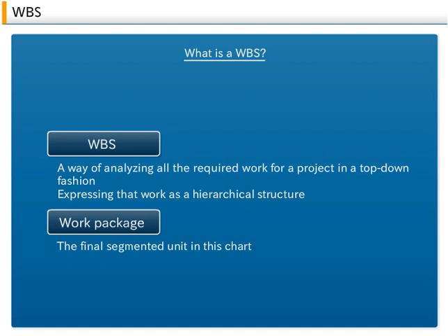One of the primary characteristics of a WBS is that each work job element will always have a product defined together with it, whether it is a tangible item like a manufactured product or an intangible item like a service. This type of standard for work division is not set in stone. For a small project, Level 1 may have 4 to 7 categories and Levels 2 or higher may be divided into a maximum of 7 categories.